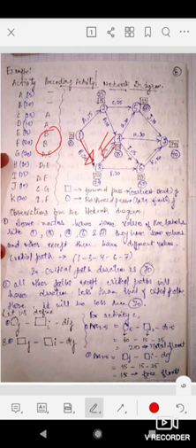Now see that activities G and H both follow D and E. You can see here, this is activity G and this is activity H. Both start at node 4, where activities D and E finish. So we have done it correctly. At node 4, G and H are starting, and D and E will be finished.